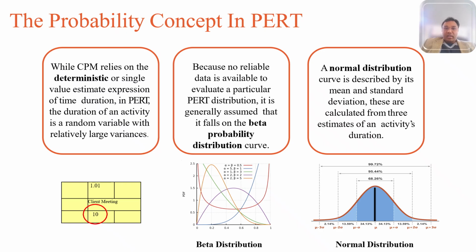That's pretty much it. Standard deviation is used in PERT because it is the most common and effective statistical measure for representing uncertainty or variability in project duration. In PERT, each activity has a range of possible times, which we know from the 3 points, and this range indicates uncertainty. But just knowing the range isn't enough; you need to quantify how uncertain the estimate is.